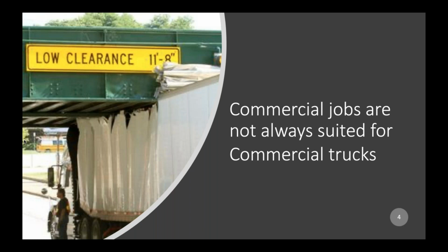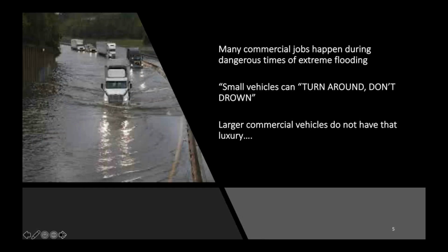You don't want to be at the job site preparing to set up equipment and then find out your equipment's not going to arrive till the next day because of low clearance. So it's up to the project manager to try to assist in getting routes around the job that can be set up so that the people and the equipment can get into the job site safely and without causing damage.